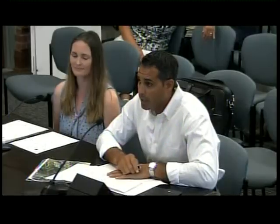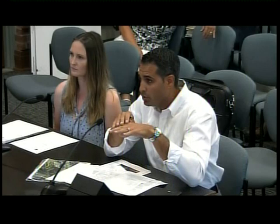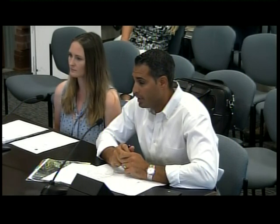In fact, the only area where we're modifying is that slanted hatch up on the top right corner. That area signifies a little depression where, when they built the original project, they filled into a point and didn't create a smooth transition into that naturalized area. So there's about an 8-inch lip there, and what we propose to do is just level that out. It's a very small area, about 40 feet long by, I'd say, 8 feet wide on average. So we are proposing to create a smoother transition there to the fence. Based on the area calcs and a depth, I estimate about 8 yards of loam and seed will be required, so a fairly small amount.